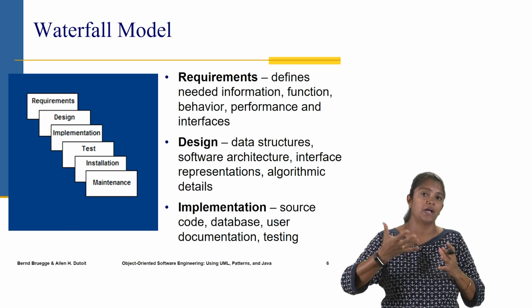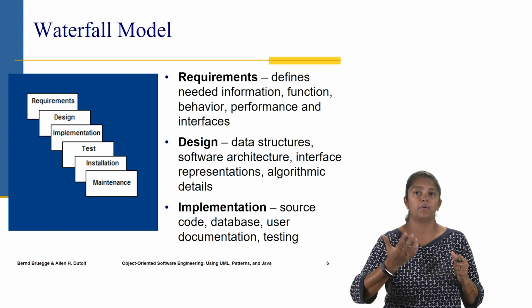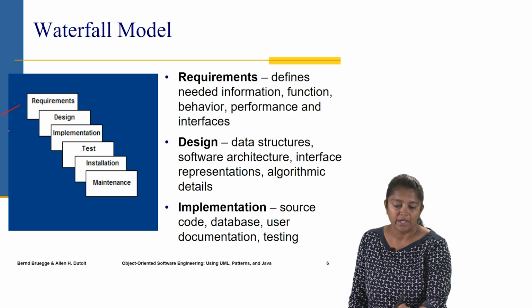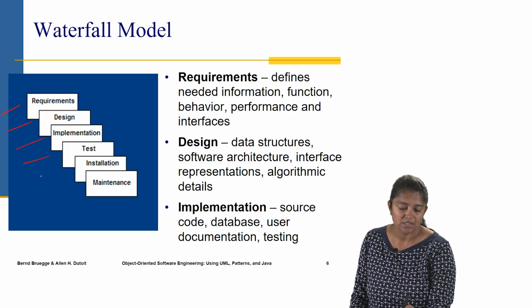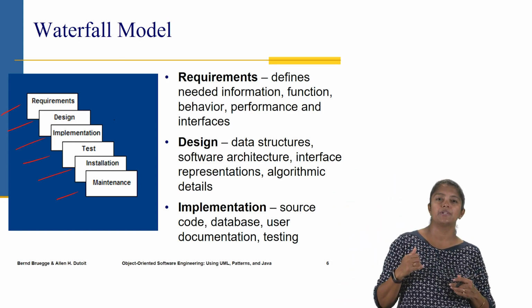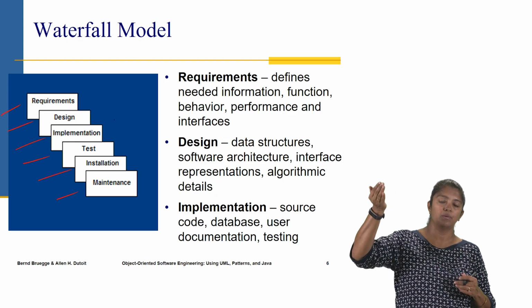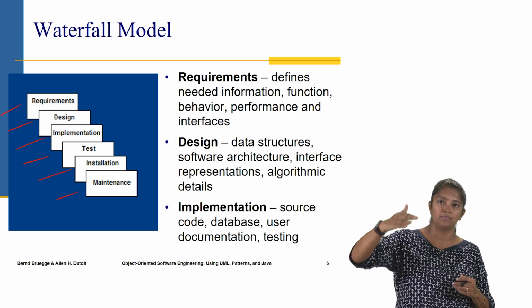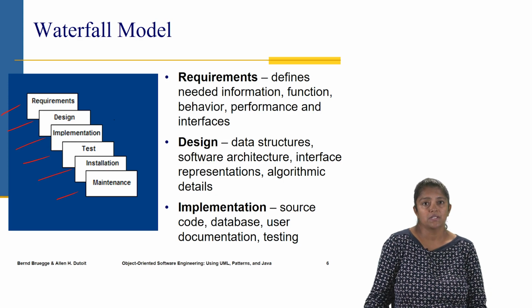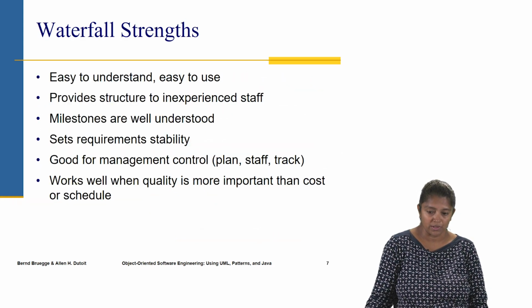The framework is laying out the activities in a sequential manner, starting with requirements, followed by design, implementation, test, installation, and maintenance. So you see that it's sequential, one after the other. Complete requirements and move on to design. Complete design, move on to implementation, and so on. So that's called the waterfall model.